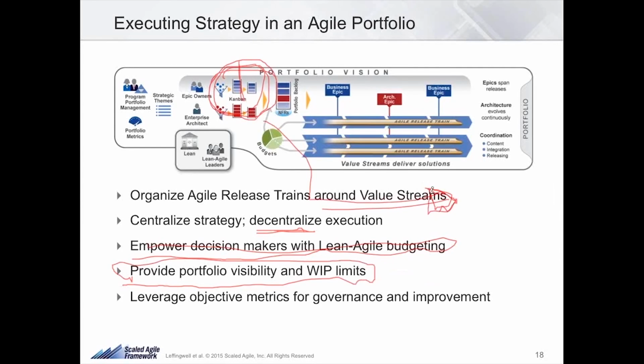And if you're having issues in product development or solution development right now, you might ask yourself the question, have we bitten off more than we can chew? Have we decided to do more than we actually can? And what happens when you put too much work in a system? The system bogs down, work in process goes up.